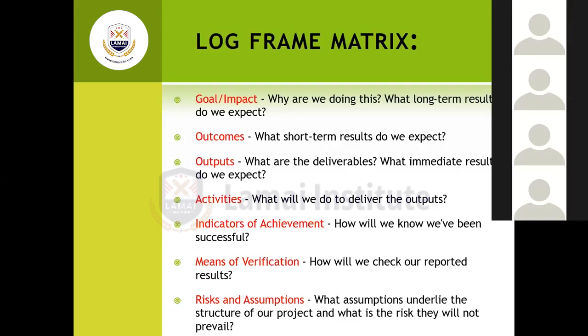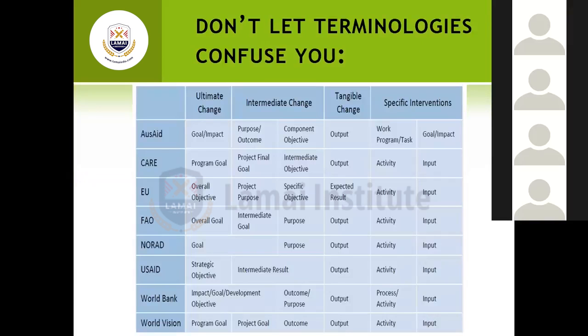Then again, the other one is the means of verification. How are we going to check that our reported results are accurate? And then the other thing is also the risks and the assumptions. That is, what assumptions underlie the structure of the project, and what risk is there that they will actually not hold. So it is important to make sure that we are able to achieve that.